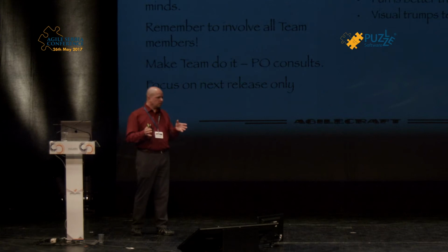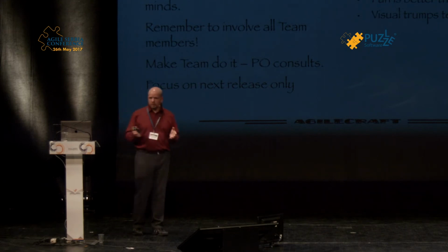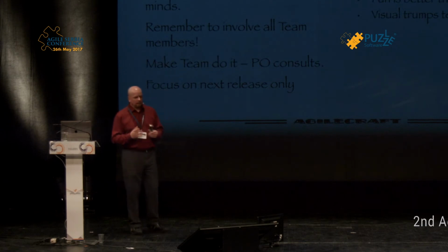Focus on the next release. Don't think like, no, of course, you will have a vision of the product for 3 years or 5 years, what are the scope of relevant planning, how you're going to change the world kind of thing. But the focus of this workshop should be on the next release, the next goal that the people are working towards collaboratively. When you have that workshop,